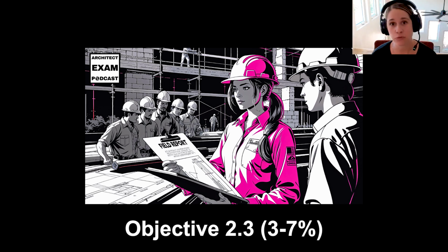And I think that understanding the schedule of values is particularly important here because when the contractor submits a payment application to you, you'll need to verify that the work they're billing for is actually completed and in place before you can approve that payment application. For example, if they're claiming on their payment application that 75% of the framing is complete, but you go onto the job site and you see that only maybe 50% of the framing is complete, that's a problem. And so that's where the schedule of values becomes your roadmap to track those financial pay apps and that progress. It keeps that consistency and accuracy so that everyone gets paid fairly for the work that's actually completed on site.